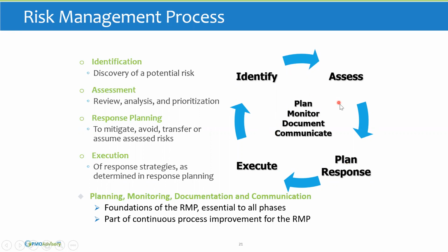Now, if you map this to the PMBOK guide, they have a process called implement risk response. And actually, when I had first created this process myself to use, the PMBOK guide did not have any execution of the planned responses. Well, what they found is that people would plan responses, they put them on the risk register, and they wouldn't actually execute them.